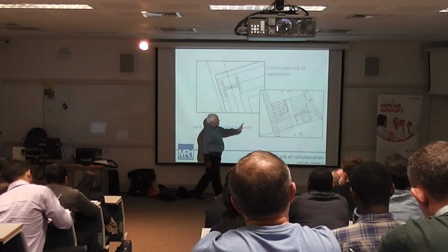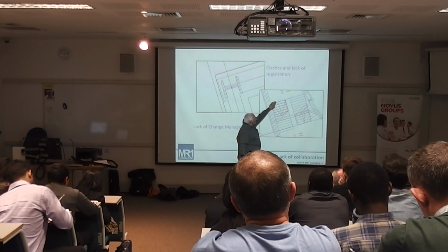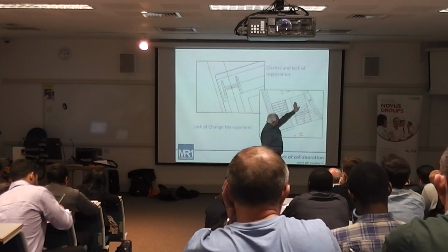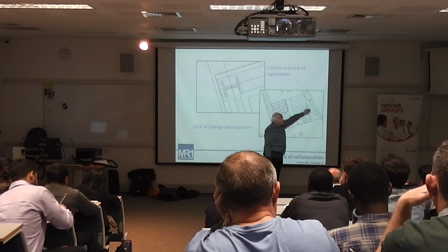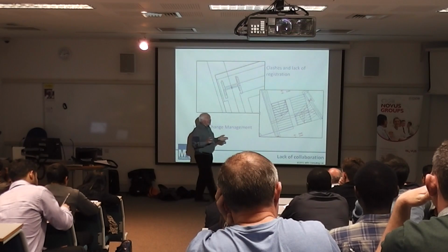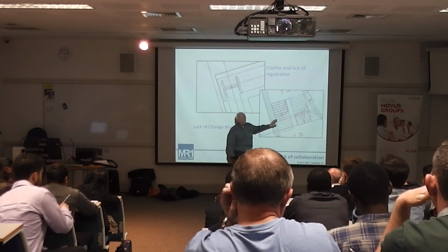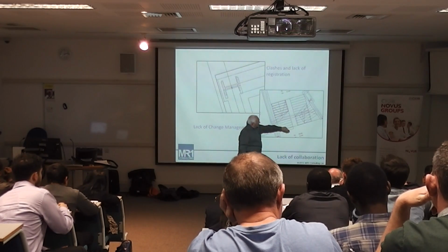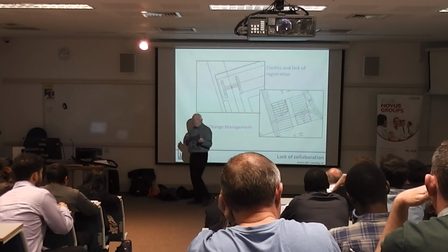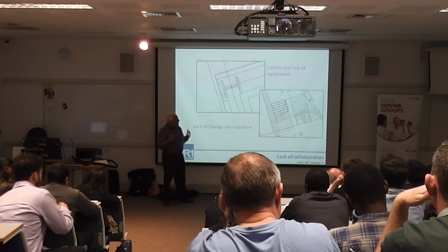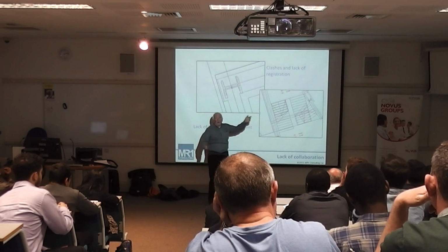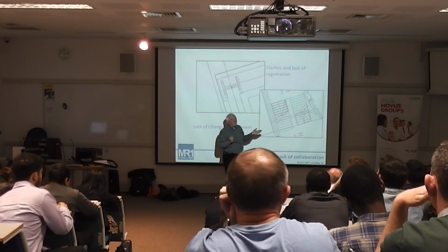Change management. How did this occur? We have the architect's layout, the red, straight staircase and an angled staircase running parallel with the side wall. The structural engineer, doing a bit of value engineering, says, I can actually give you a cheaper staircase if I just put them both parallel to one another. They did not communicate with one another. It arrives on site, and we now have two pieces of information, and we're not quite sure which one is right.